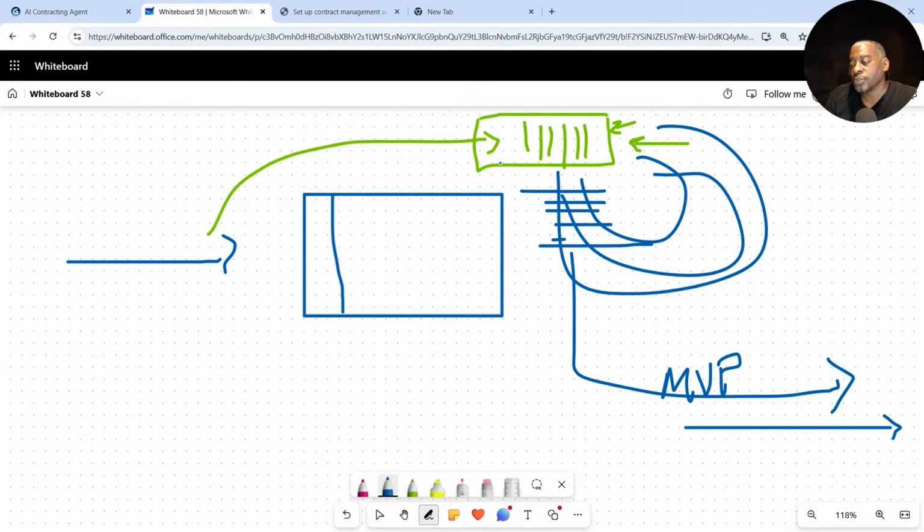We give them an issues list, we triage the issues list, make sure it has the right priority, and then we go from there. Sometimes we will size these up. So in addition to the issue, the description, and the priority of the issue, you may have a level of effort, right? Critical items that have low level of effort are usually the first to go. Then it's okay, this is a medium effort or this is a high effort. A high critical item takes some time to get to. And again, it's all the negotiating piece there.